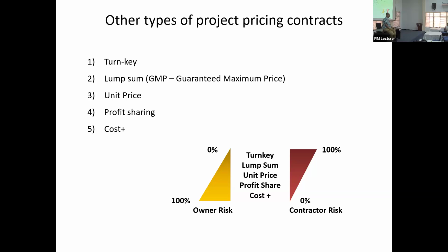And why does the pricing vary? It is because of one factor, which is risk. As we saw in the example of our Singaraja project, you can have low risk, high price. Or you have low price, take the highest risk. That is up to the management. Cost management can't say, no, don't put that much. Who can't? The cost is cost. So when you price it, it is important to know how you want to price it.